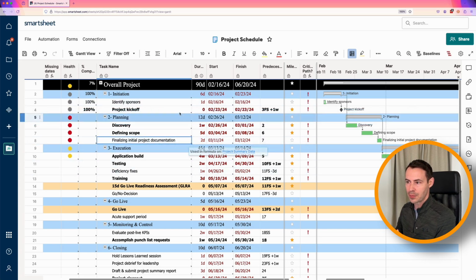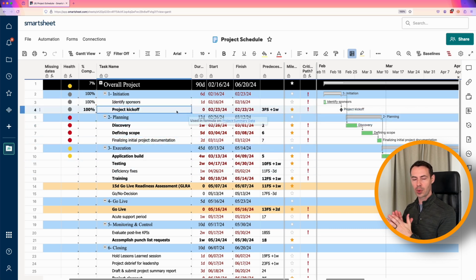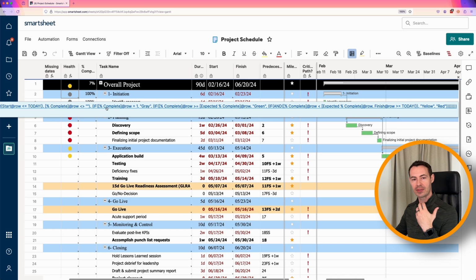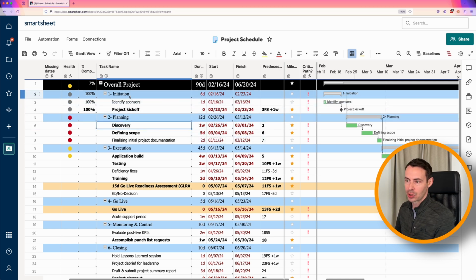So this is something that's important to note as we do this checkoff for what we have at individual tasks. The health is represented for that task. Similarly, once we get to the completion of an individual phase, that phase is going to inherit whatever we have down below it for the tasks that compose that body of work. Similarly, once we look at the phase level, all of that rolls up to the overall project so that we really just maintain what we need to maintain at the task level. The plan is going to take care of the rest for us.